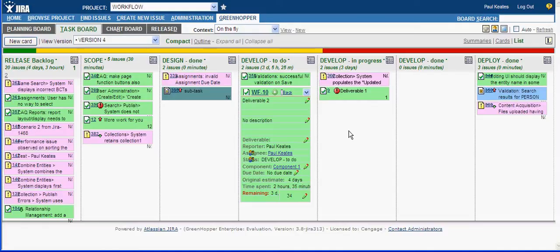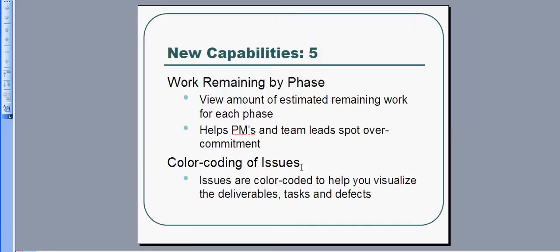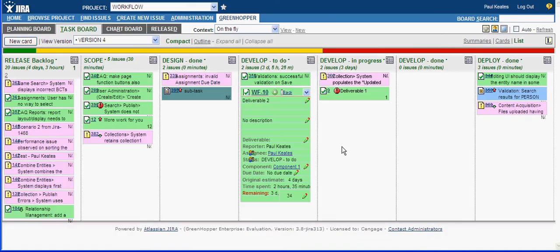If not, well, you can still do burn down by gross deliverable velocity coming out of each particular phase. So if you had 18 things to do in a release or version, and you had 10 days to do it in, you could still see a burn down line, but you're not going to get as meaningful data. Let's go ahead and look and see what else.